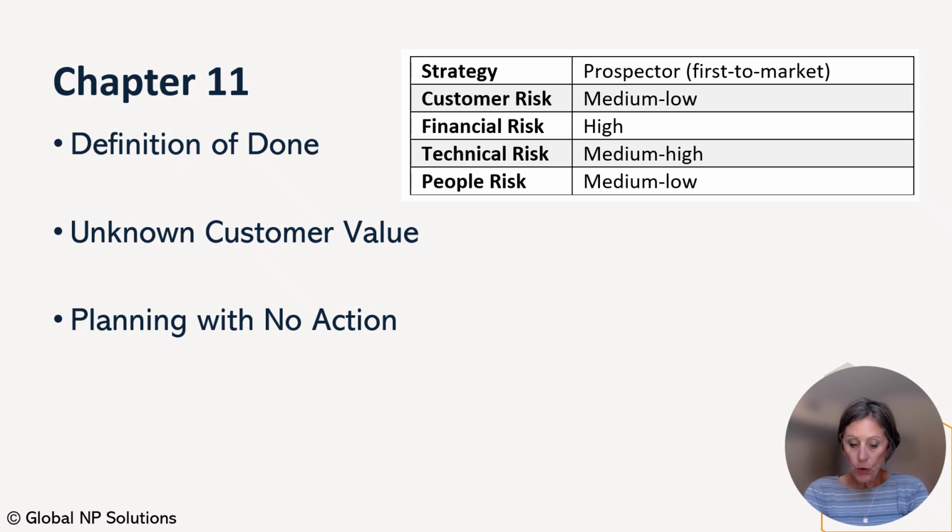In our consulting work, we were introduced to a company that had instituted weekly, monthly, quarterly, and annual planning with the hope of improving communication and speed to market for new product development. They sincerely believed they were operating under an Agile methodology. Yet goals and objectives changed at each planning meeting, impacting not only team objectives, but also their ability to achieve strategic business goals. At this firm, product owners, business analysts, and Scrum Masters were continually called upon to present estimates for the newest and latest plans.